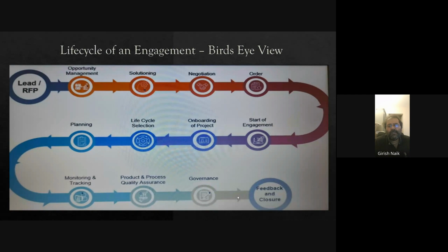So when you receive a project basically, you do an estimation and see how much person month effort is required. Person month effort means one person's one month of effort; like that, how much effort is required, that's what we estimate. The estimation again depends on what kind of project you are estimating.